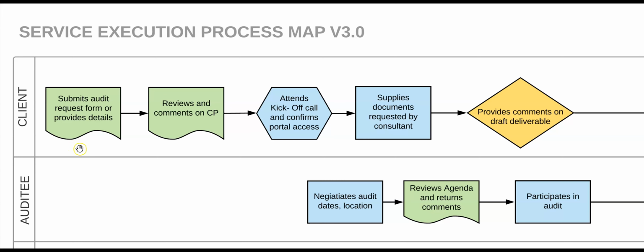As the project begins, the client will submit the appropriate information about the project through the audit request form and CAPA if contracted. This will allow us to identify the appropriate resource for each client's project needs. After the resource has been selected, the next step would be for the client to attend the kickoff call. The purpose of the kickoff call is for the project manager, resource, and client to discuss the audit process, applicable regulations, as well as any other supporting information for the audit.